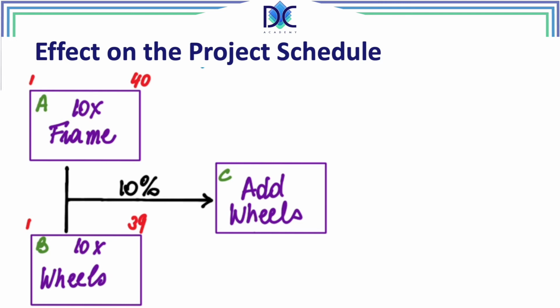We can extend it, or we can just complete the wheels because those go faster. We can say we will finish the wheels in 20 minutes and we have some extra slack time. And once the wheels are finished, the person working on the wheels can in fact be allocated to some other activity if it would be necessary. There are different ways to deal with that.